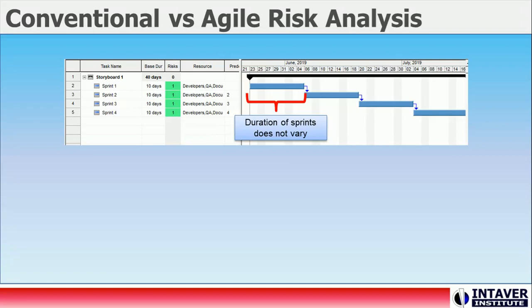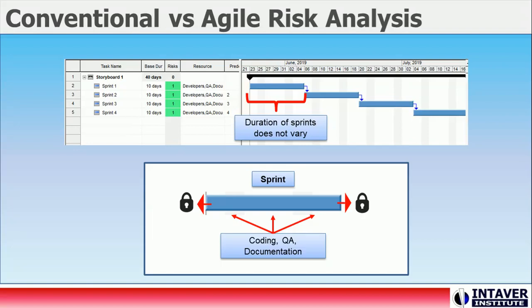In comparison, though Agile projects are subject to similar risks and uncertainties, they use sprints which have a set duration that never varies. Each sprint contains multiple activities, and at the end of each sprint a working product is produced. If the planned work is not completed in a sprint due to underlying risks or uncertainties, it is moved to the next sprint. This process continues until the finished solution is delivered. Agile teams must estimate how many sprints will be required to deliver the final product while accounting for risk events and uncertainties.